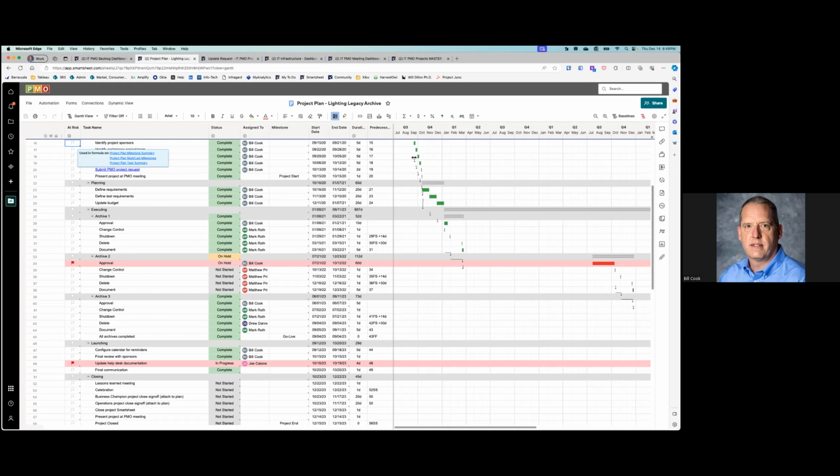They could have this plan, it's turned off by default, but it can have its own automations, and it could send a notice to whoever's assigned a task if it's late. So when a date hits, project goes late, send a status update request to that project manager, saying, hey, what's going on with this task? And Smartsheet then would manage this sheet as well. We don't do a lot of that. People do it sometimes, but mostly the project managers manage the entirety of the project. So hopefully that was the question.